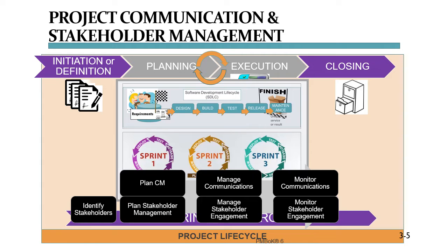As you can see on this slide, the project communication and stakeholder management process areas go together. Before you can plan stakeholder management, though, you first need to understand who your stakeholders actually are. Then, as you figure out which of your stakeholders need what kind of information about the project, that's when you plan your stakeholder management and at the same time your communications management as well.